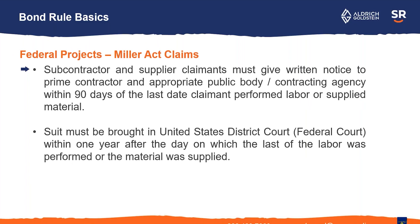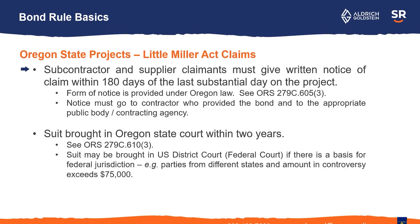As far as timing goes for bond rules, you need to file your claim within 90 days of the last day that you perform work. You'll have to bring a lawsuit within one year in US district court — that's in federal court. As far as an Oregon state project or bond claims, you have to give your written notice within 180 days, and then you need to bring your suit in Oregon state court within two years. It's possible you could end up in federal court, but generally you're going to file in Oregon state court.